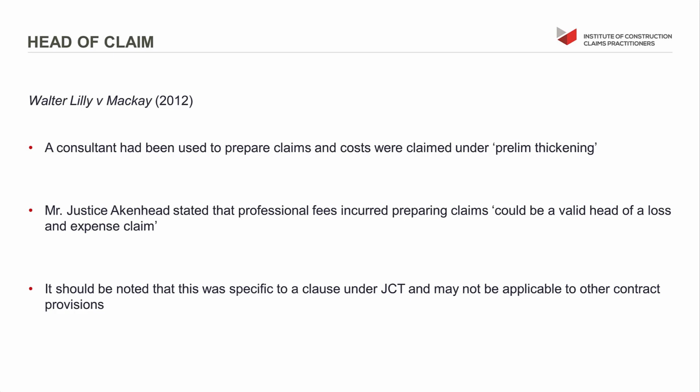So the second way in which it's possible to recover your claims is a little bit more in line with what we normally do when we're submitting a claim, and that's to include it as a head of claim. This is the situation that I talked about briefly in the opening introduction as to why we tend not to get claim preparation costs paid. They're included as a head of claim, and they're then struck out by the contract administrator because they're not permissible under the contract. Well, there are precedents for recovering your preparation costs as a head of claim.